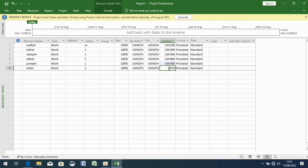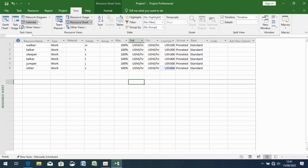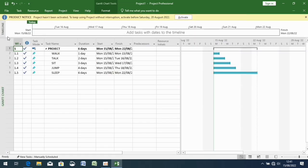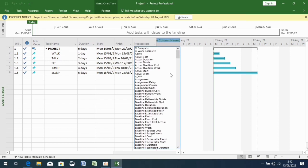After that I go back to View and choose Gantt Chart, so that I can go back to the chart. Then you're supposed to create a new column for project costs: tap on Insert Column, insert a column, type in 'C' and then choose Cost. You will get the column for costs — in our question it was in US dollars.